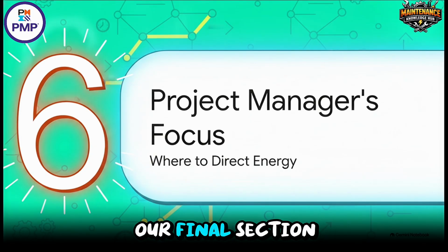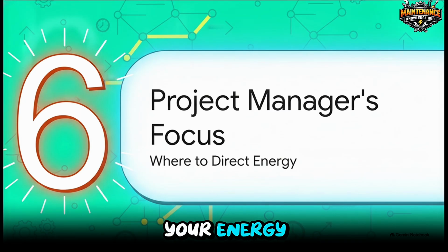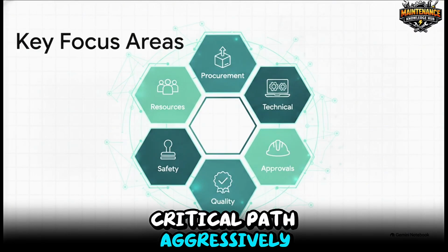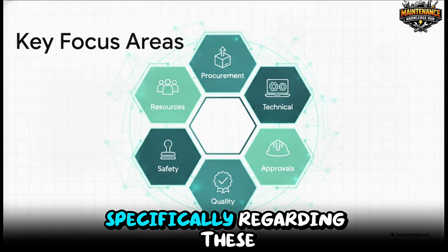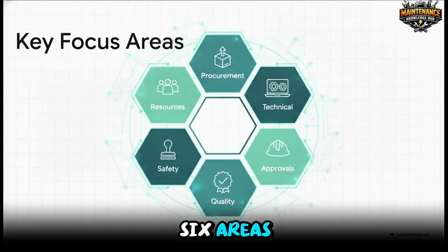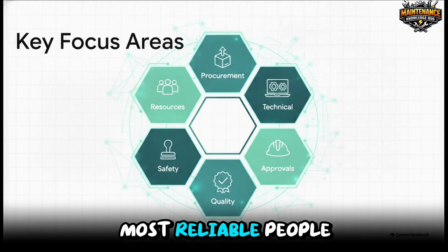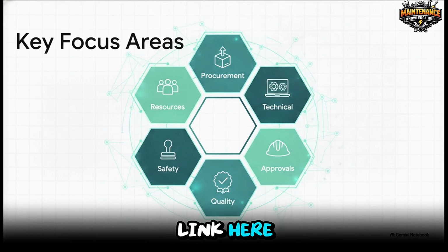Let's transition to our final section, the project manager's focus, where to direct your energy. As a manager, your time is strictly limited, right? So you have to guard the critical path aggressively. Critical activities should receive your closest attention, specifically regarding these 6 areas. First, resources. Are your absolute best, most reliable people assigned to these critical tasks? You just can't afford a weak link here.